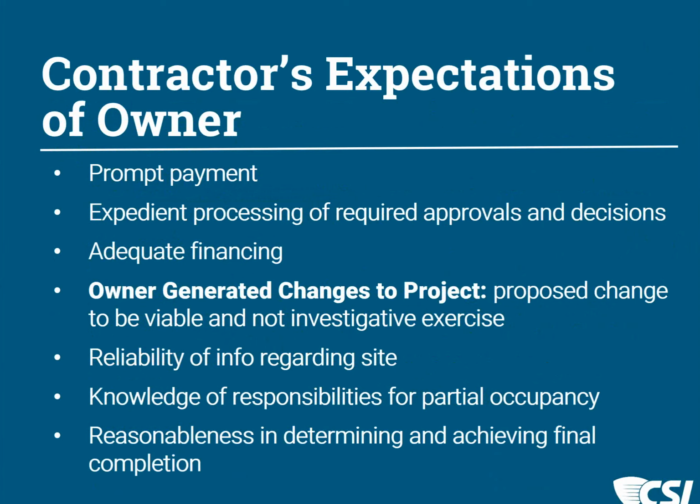So what's the contractor's expectation of the owner? Money, prompt payment. A paid contractor is a happy contractor. All things considered, if things are moving like they should, making prompt payments so that the contractor can pay and perhaps receive discounts that are within material contracts that they have, critically important.